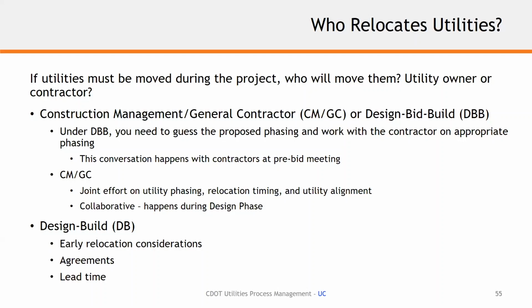And so we had a mandatory pre-bid with all the contractors that came in, and they listened to our phasing plan. We had a lot of contractors that said, we would have never considered that. We would have just considered opening up all 10 miles, replacing all the culverts and putting in the deep foundation stuff and all that in the 10-mile corridor, if you hadn't given us pre-bid notice of your phasing plan. So ultimately, the contractor that won the bid